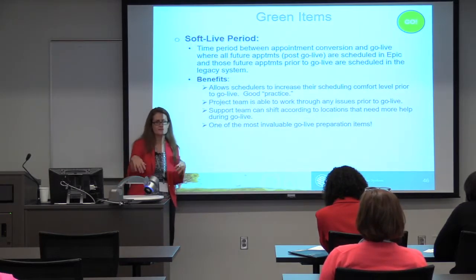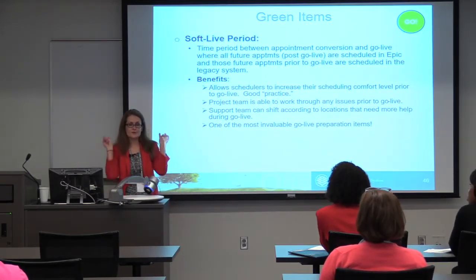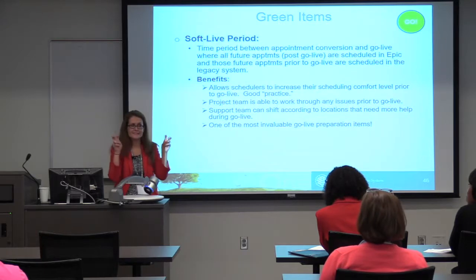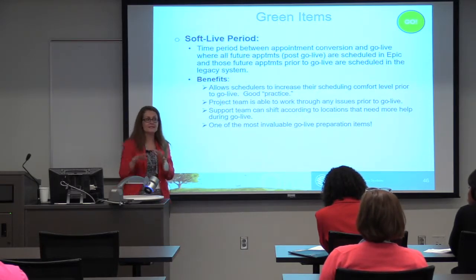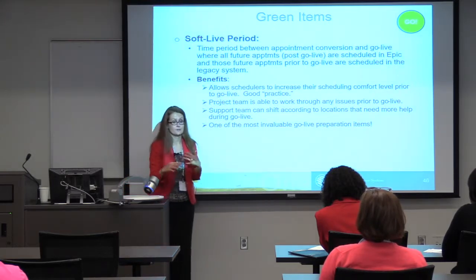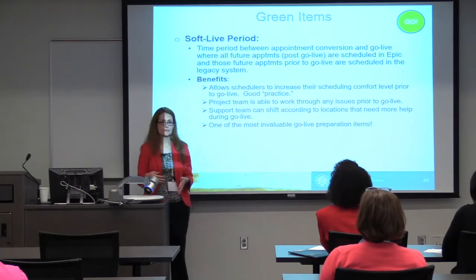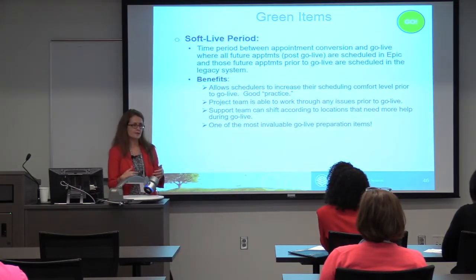That sounds complex and difficult for people, but it allows our users to practice. I say practice, but it's not practice, it's real. It gives them an opportunity to not feel the pressure of someone standing there and having to get this person registered. Why is this not letting me go? They start to get more confident in the system during this 2-week period that we have prior to Go Live.